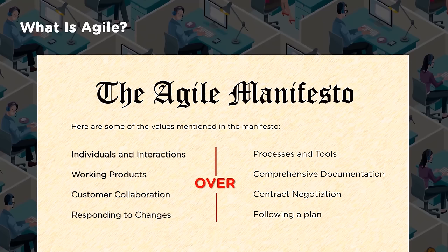Now, if I have a working product, say a bigger product, I keep creating every small module of it and start integrating it into the base model. I will only focus on the documentation for that particular working piece which I'm going to create in the next iterations. Then my documentation changes are less. Initially I would have a full skeleton, the roadmap, of the entire product, and upon that I make the detailed documentation only for that working piece rather than the full product itself.